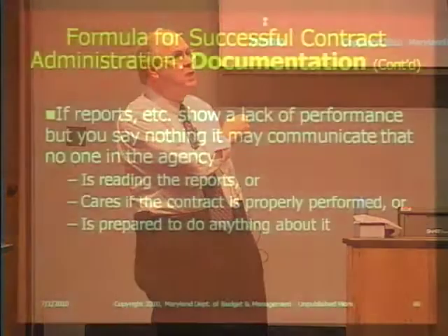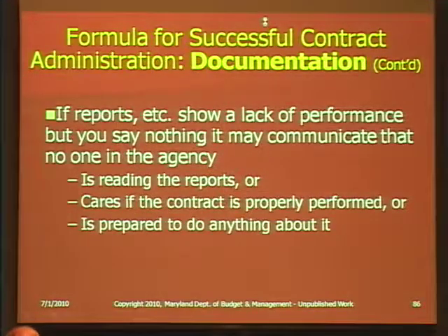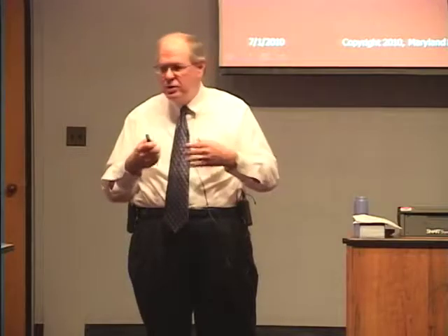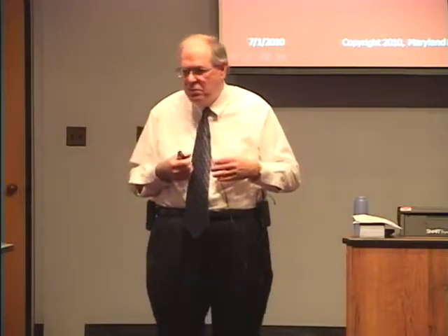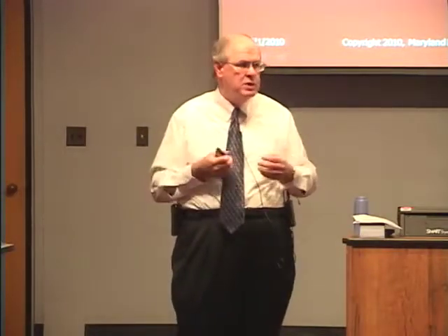If reports show a lack of performance, but you say nothing, it may communicate that no one in the agency is reading the reports. And I've had this lots of times. I've had solicitations where I'm reviewing them, and there'll be requirements for certain reports, and I'll talk to the program people and say, okay, what do you do with these reports? Sometimes I get people who tell me exactly what they do with the report and how they use it. And sometimes I get people that say, I don't know, it was in the specifications of the contract before this, and I just used the same specs. I don't know who gets that report. I don't know if anyone looks at it.